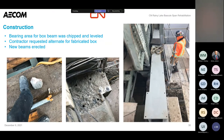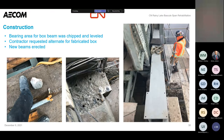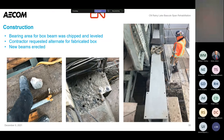Under the box beams, they chipped out the area a little bit and placed a level pad to make sure there was good bearing. An interesting photo shows the size of some aggregate in this concrete — mass concrete poured in the early 1900s, unreinforced, with big chunks of rock thrown in. The contractor ended up going with a fabricated box rather than W shapes welded together, using unique methods — cutting holes in the top flange to weld the stiffeners and connect them structurally. In our opinion it was a little more tricky, but based on the fabricator they brought on board, that's the route they took and it all worked out well.